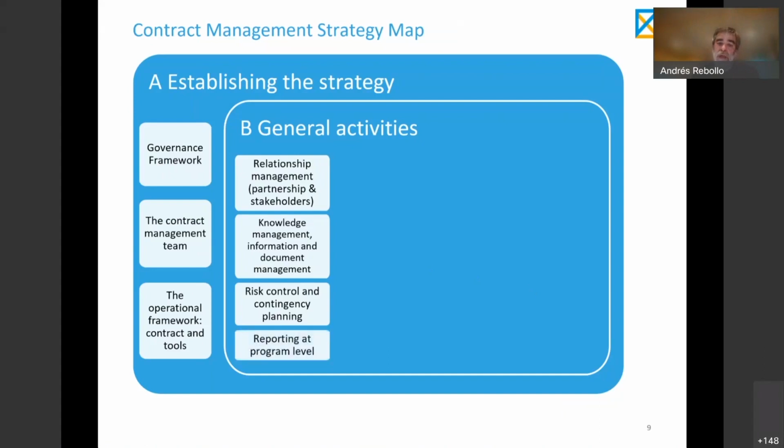And last, we have the reporting level, which could be considered as part of managing stakeholders in the sense of internal stakeholders, the internal government upstream stakeholders like Ministry of Finance, for example, and how a proper PPP framework should establish procedures for reporting upstream things like, for example, fiscal impact, monitoring how the project is evolving in terms of risk values and contingent liabilities and similar things.